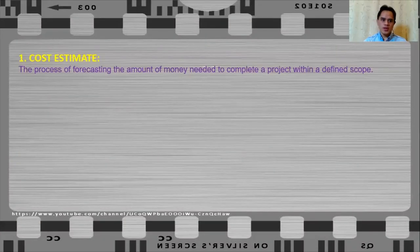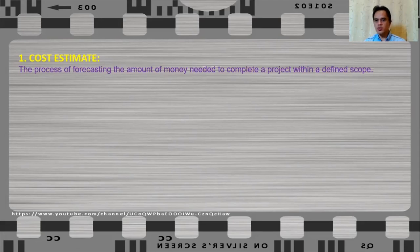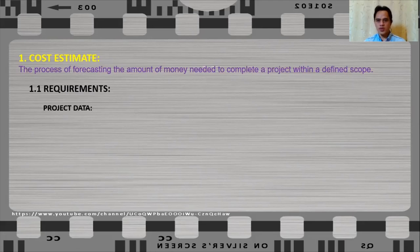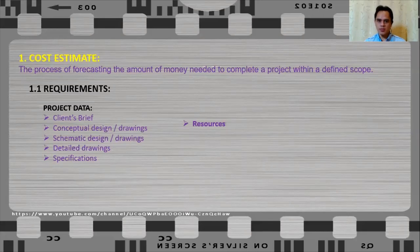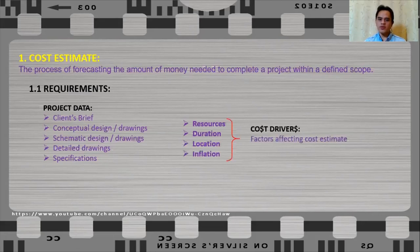To begin with, let us define a cost estimate as a process of forecasting the amount of money needed to complete a project within a defined scope. In order to carry out a cost estimate, you must have project data. This may include any or all of the following: the client's brief, a conceptual design, schematic design, detailed drawings, and specifications. You also have to consider several factors such as the resources, the duration of the project, the location of your project, and inflation. These are only a few of the factors that will affect your cost estimate, or what are called the cost drivers.